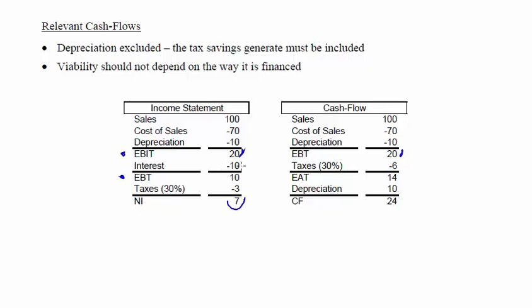We should evaluate the cash flow assuming that the company has no debt. So if the tax rate is 30%, now we evaluate 30% of this value. So the tax that we have to pay in this case, if we exclude the interest, is higher. Then we obtain what is called the earnings after taxes. Well, we include here depreciation. I'm sorry, we subtract here depreciation.